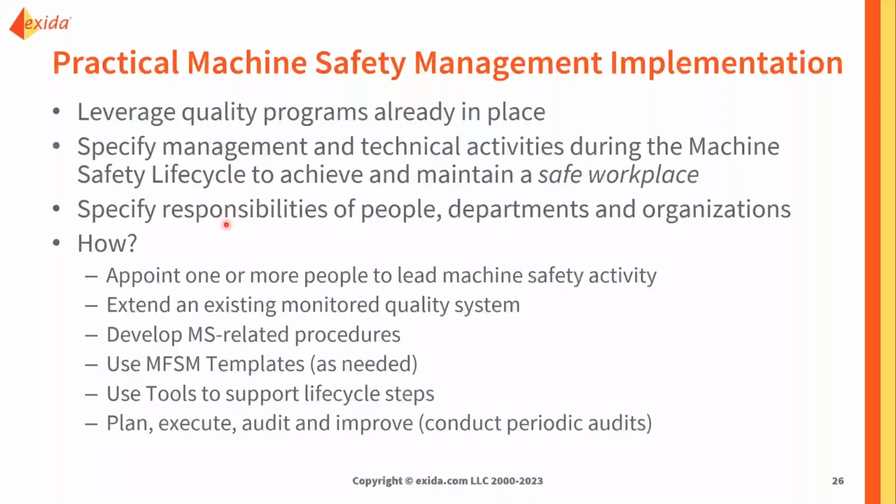Looking at the people, the departments, the organizations, who's actually going to be responsible for driving it, making sure that you have at least one or more lead machine safety personnel for each different activity, making sure that they have support and buy-in from the management and the supervisor team, and then developing your top level procedures, building templates that you can use for the different life cycle steps, and leveraging tools and basically things that are already there to make it as easy as possible to move from the starting point to the desired endpoint. So all of those things can help make it a little bit easier to get there.